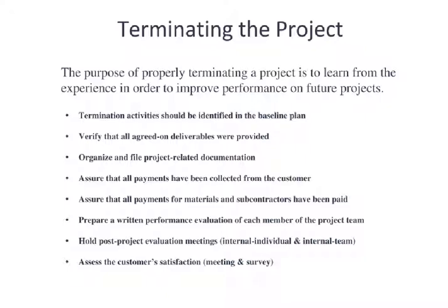With that in mind, this needs to be something that is agreed to, at least in part, with the customer. There will be certain deliverables due upon completion of the project. The customer needs to be in agreement as to the list of those deliverables, when they will be provided, how they will be provided, and to whom they will be provided. That needs to be determined up front at the very beginning and be part of the plan. If not, it can really lead to some unforeseen and unexpected last-minute work that can really delay completion. Okay, so plan early.